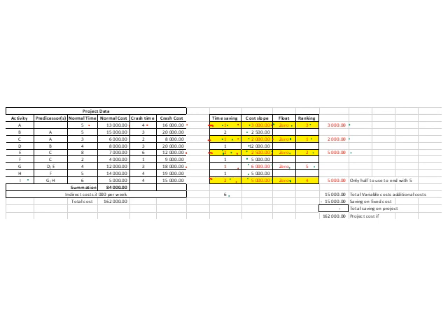You will see our next ranked item is item I, and we only have to save 1 week here. Thus, we don't multiply it by 2. Here we only multiply it by 1, so we have an additional cost of 15,000 rand if we add all of these together. So we've got our additional variable costs that we calculated. You will see only half is used, that's why it's there.